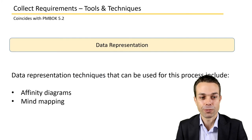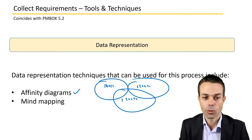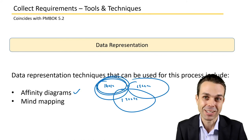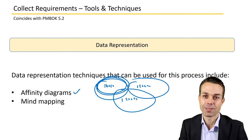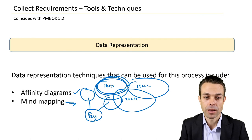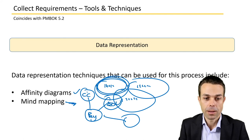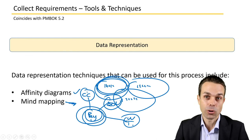We'll need to represent the data once we've gathered it. Affinity diagrams collect all similar ideas and group them together — perhaps grouping related ideas into the same feature to deliver at the same time, showing their affinity. Mind mapping takes a central theme — for example, payments — and maps out other themes that come out of it, such as credit cards, ease of use, web-based access, and telephone-based access. That's mind mapping.